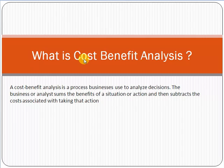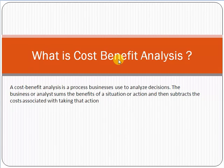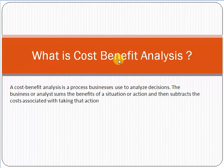Cost-benefit analysis means we consider both the cost and the benefit when selecting a project. This is the technique we use when selecting any project. For example, if a company has two projects to choose from, before starting either one, they do some paperwork to calculate how much cost they have to incur and how much benefit they will get after some time.